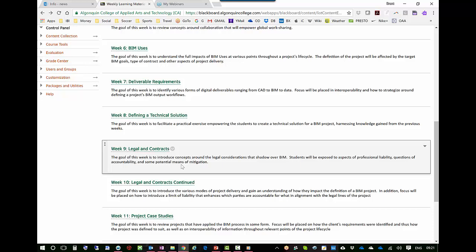So initially looking at the BIM contract appendix and what it means to start to infuse the BIM requirements into the contract itself, instead of just relying on what tends to be the case in the industry, where it's we shall do BIM and we'll define it later on in a BIM execution plan. And that BIM execution plan could have quite damning ramifications that maybe increases in scope with not enough fees, and it causes all of the issues around the myths of BIM, many of the issues.